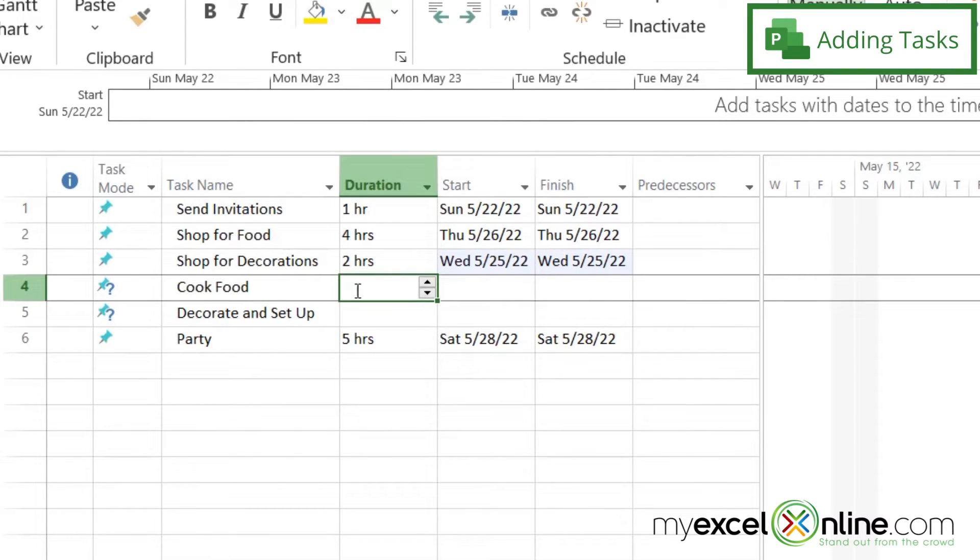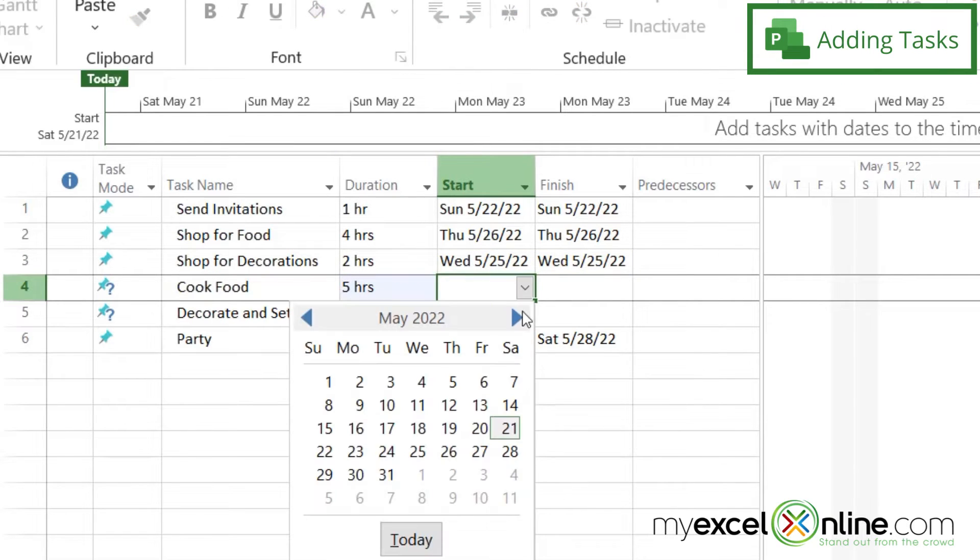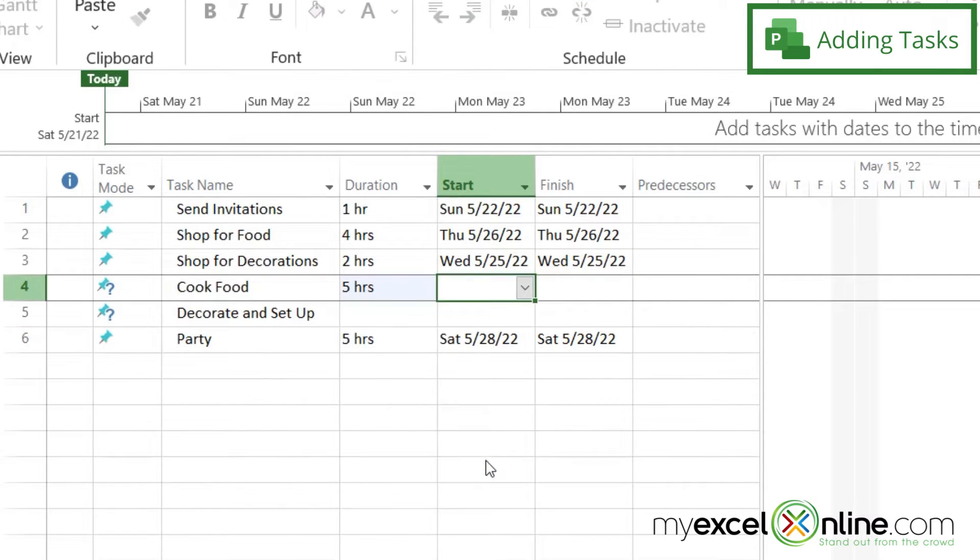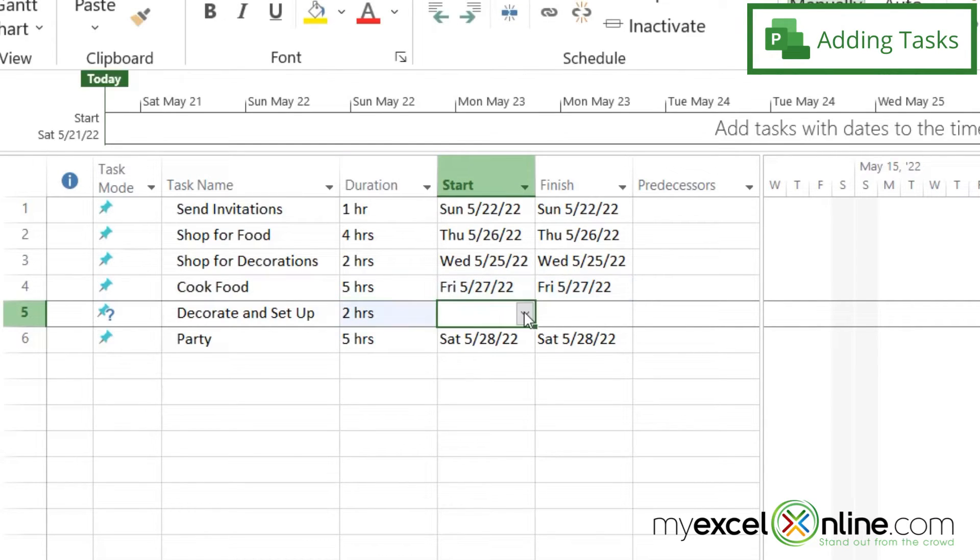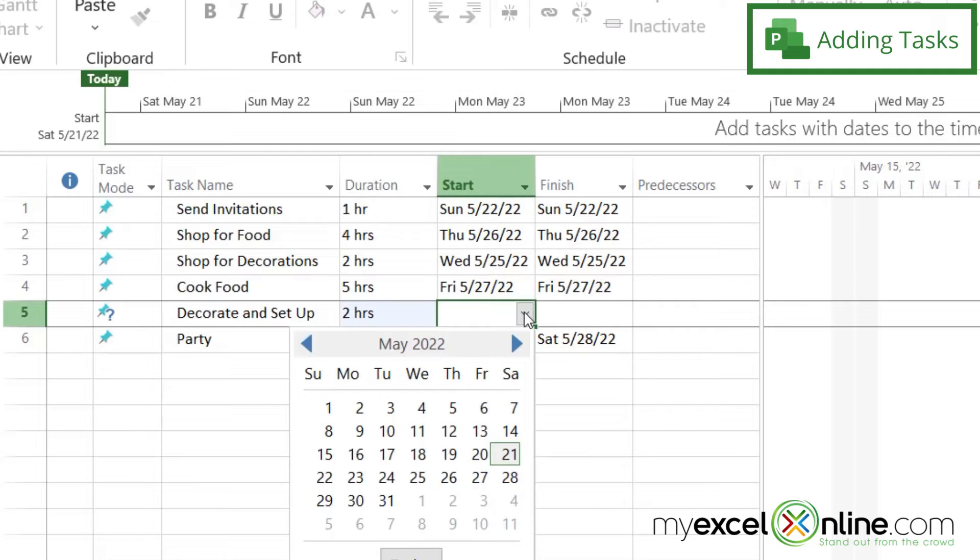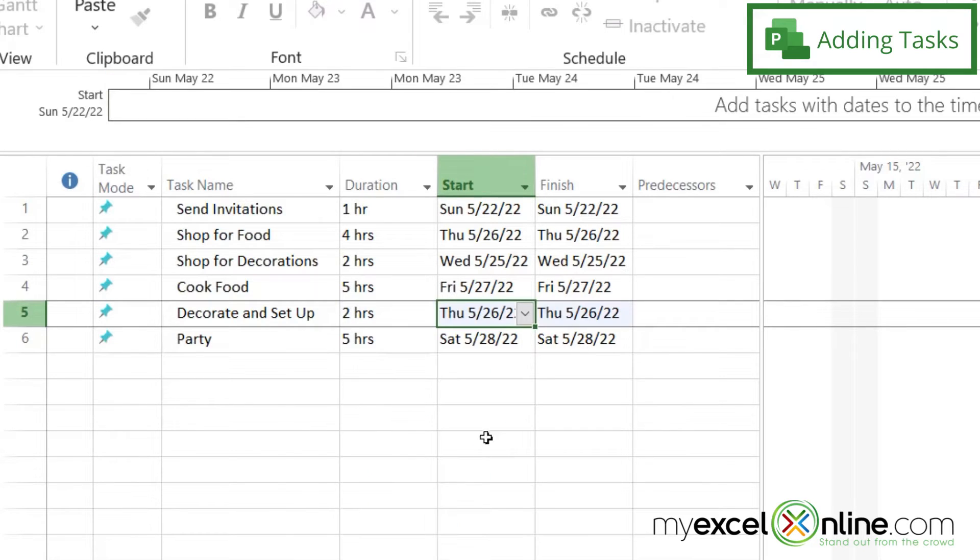And then let's say cooking food is going to take me about five hours, and I want to do that the night before the party. And let's say decorating and setup is going to take another two hours, and I could do that two days before the party.